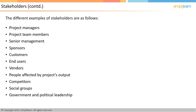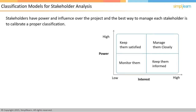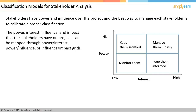Not all stakeholders have the same amount of influence or power over the project. Therefore, the way to manage each stakeholder needs to be calibrated based on a proper classification — this is the role of the classification model. You can come up with a grid that maps the power of the stakeholders, the interest they have, the influence they may have, or the impact they can have, through power-interest, power-influence, or influence-impact grids.